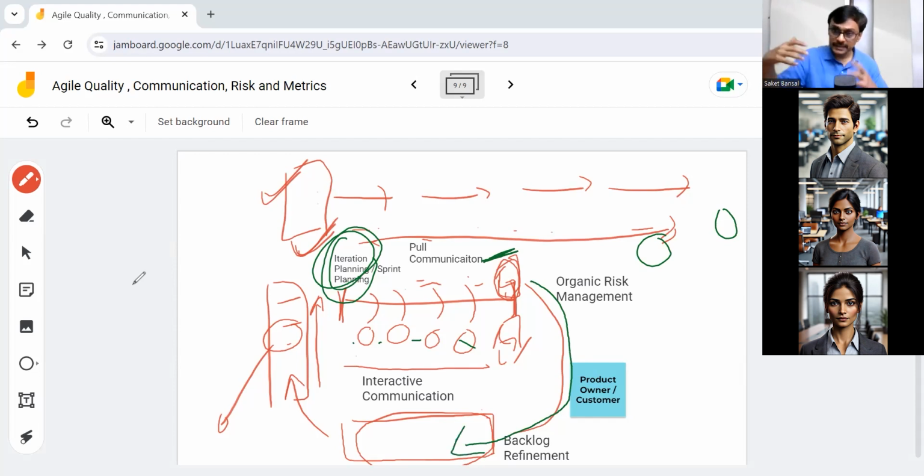Because of those technical risks, like the growth of your technical debt, you may want to create a task to redesign your portion of code, a work item. We can call it refactoring work or technical debt removal work, and that work will get added to your product backlog and prioritized based on how serious you see that particular risk. The product owner and the technical people will have a discussion, and this will come as an item in the upcoming sprint. You may have a sprint goal of improving your technology to mitigate that risk.